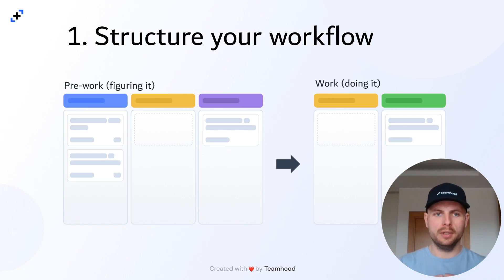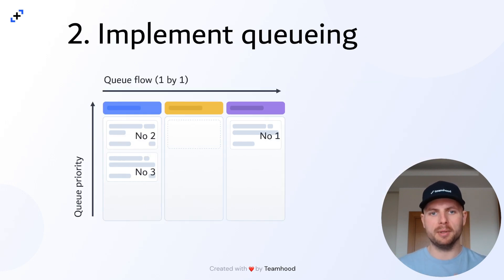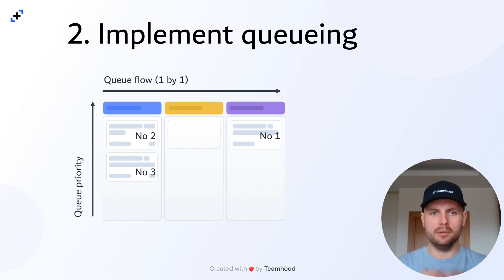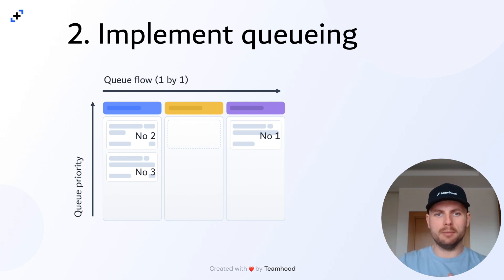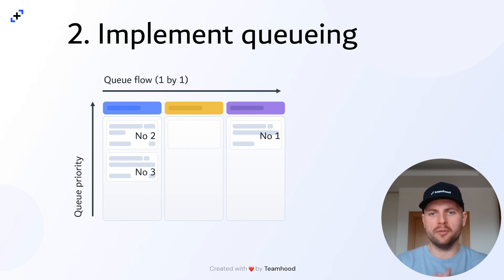If you're already good with your structure and have pre-work sorted out — usually that's about two Kanban boards, one for refinement and the other for actual work in progress — then I recommend implementing queuing. And by queuing, it's not just drawing a line of work items. It's about talking with the team and understanding what's the direction of the queue and how priorities are maintained. You shouldn't be jumping the queue — you should keep queuing and follow the queue. That is rule number one in Kanban. Topmost and rightmost items are most important and closest to the finish line. You shouldn't be adding new shiny objects or attracted to new work just because it's new — it should be placed in the queue and follow its priorities.